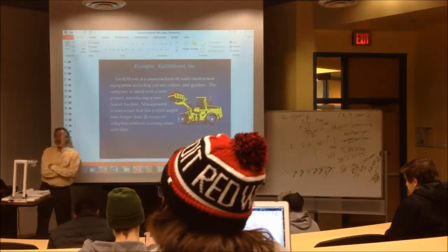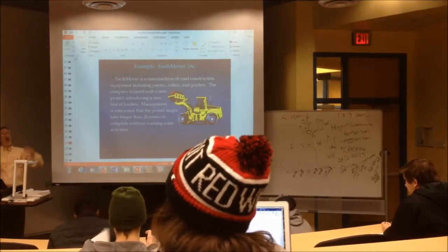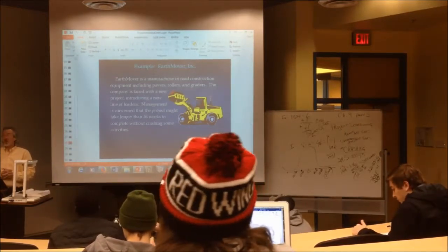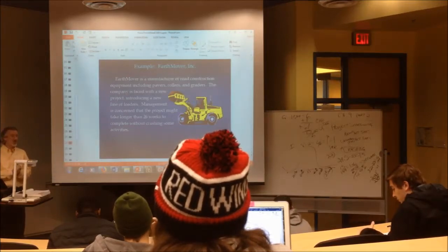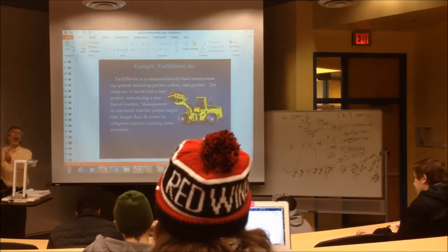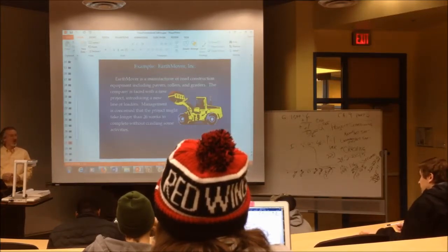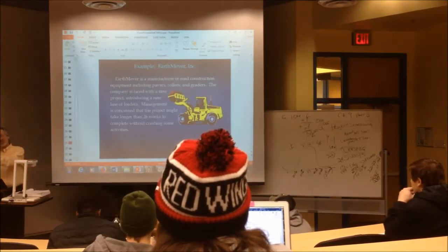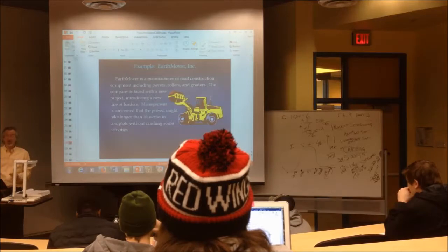You ready? This project, you get it all done. You're going, okay, here's our plan. We're going to get done in a certain amount of time, and then all of a sudden you're told, we would like to get this project done sooner. Could you put together what the cost would be if you could get it done in this amount of time or this amount of time? So you start getting on the phone and you're calling everybody involved in these activities and saying, hey, I know it costs this much for an activity, but if you had to add additional staff to get this activity done faster, how much would the additional cost be?